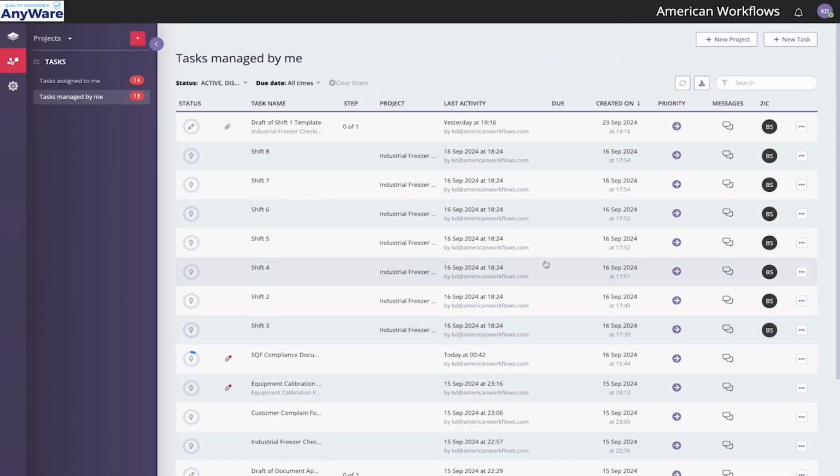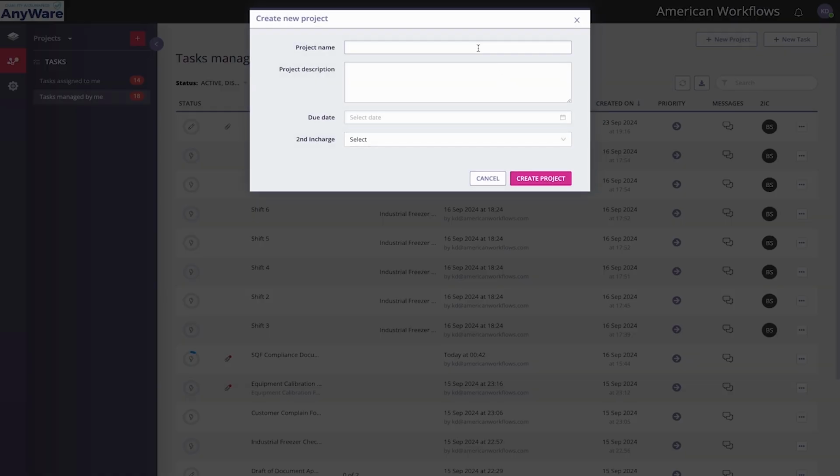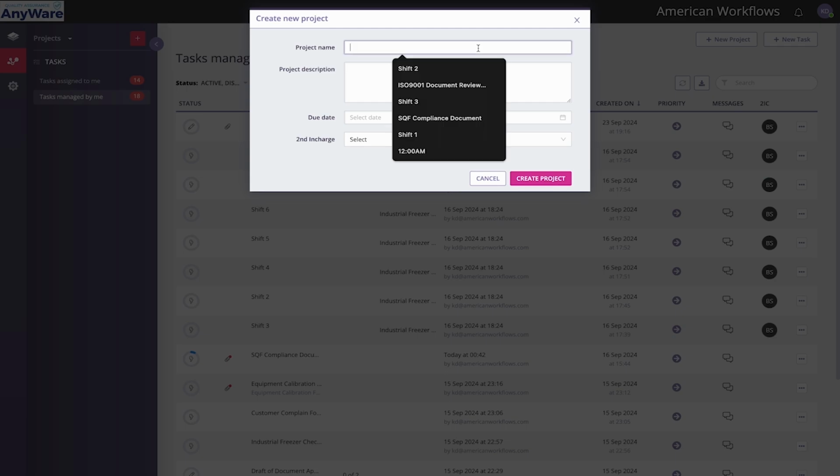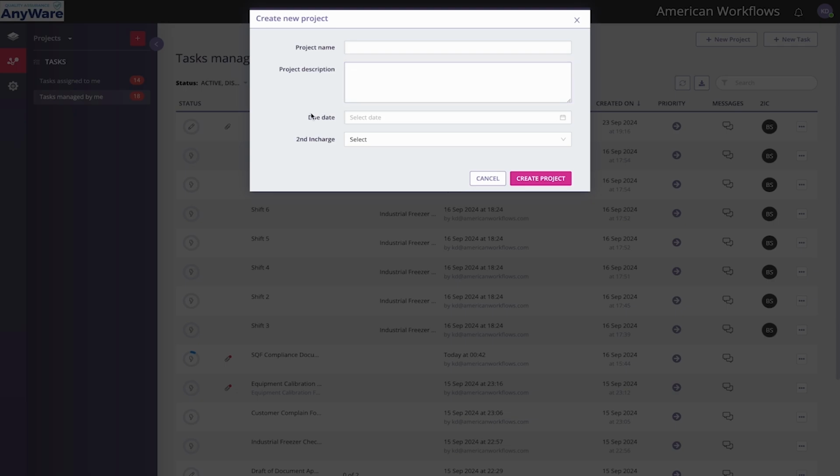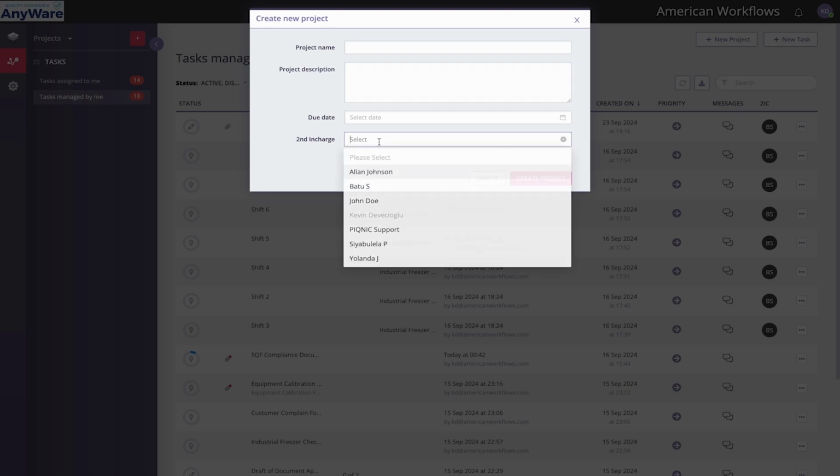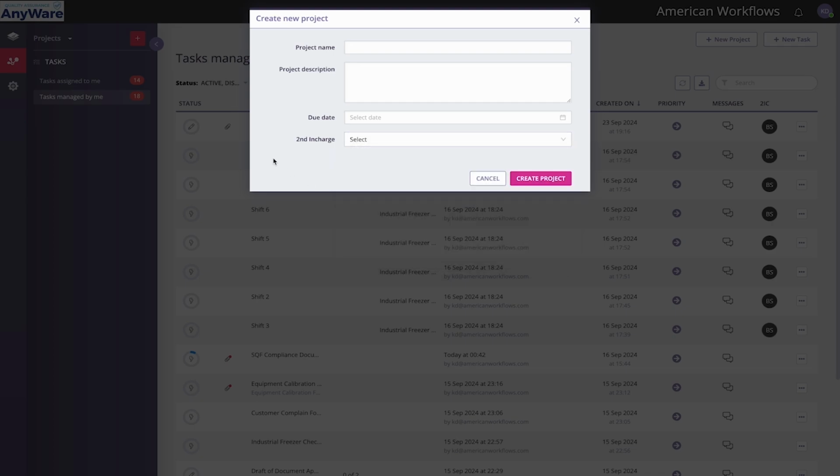If you want to add a brand new task, we have that on the top right. We can create new tasks or new projects, right? Actually, let's talk about the new project first. If you want to create a brand new project, we can do that through here as well. In order to do that, we hit the new project button. Then we have to fill in the project name and project description. We put the due date of the project, and we can also select the second in charge for the project as well. After that's all filled, we can create the project through here.